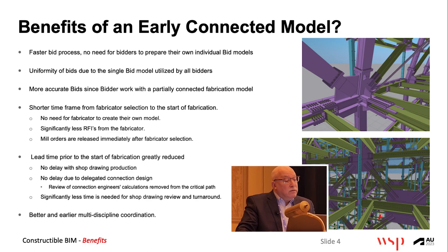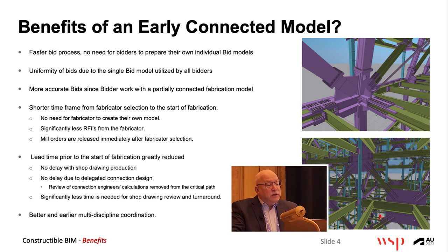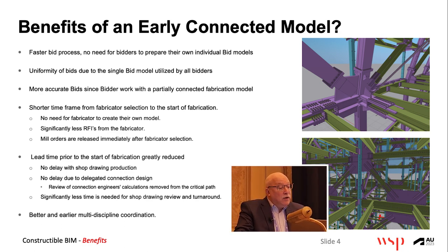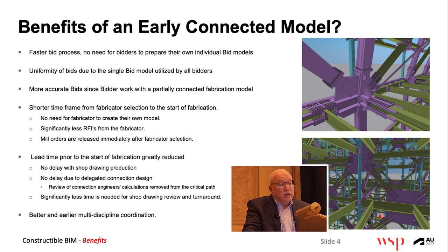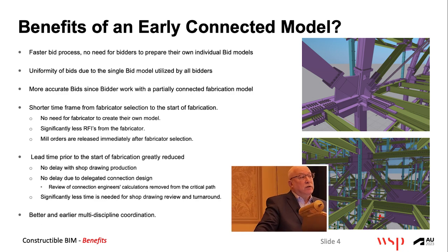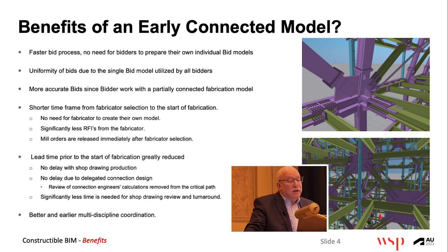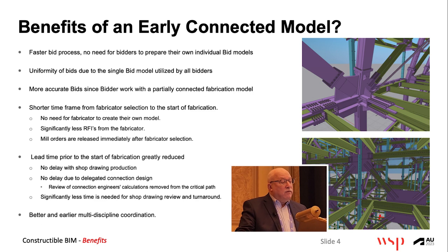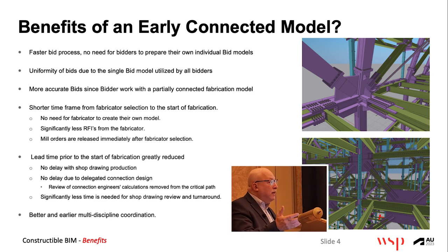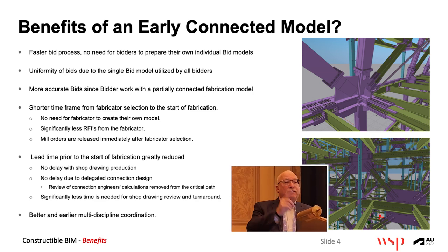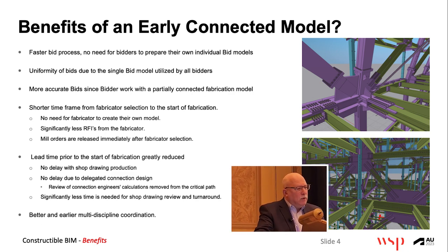What's the benefit? I'll get specific later, but these are the benefits. Faster bid process. No need for the bidders, whoever's bidding on the steel, to prepare their own individual bidding models, which is always the case on every project that I've been involved with. You get 5 bidders, whatever, submitting 5 bids, and they all have different tonnages, and they all have different piece counts, and the client turns to me as the engineer, what's wrong with your drawings? No one understands it.